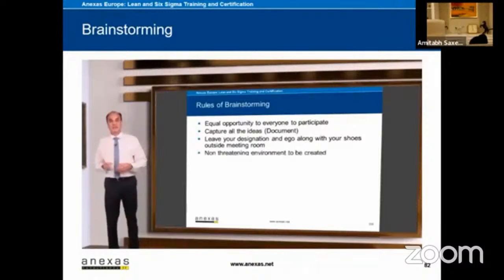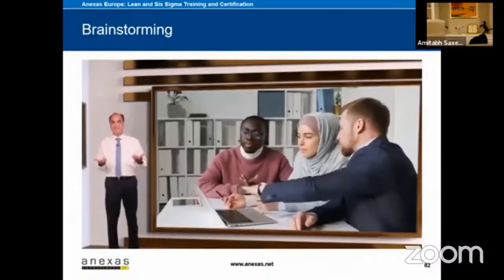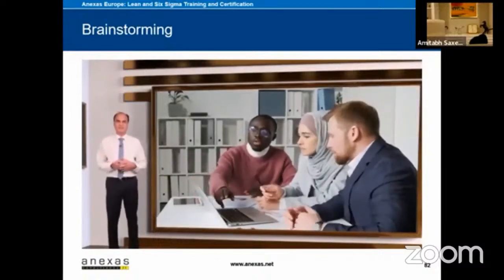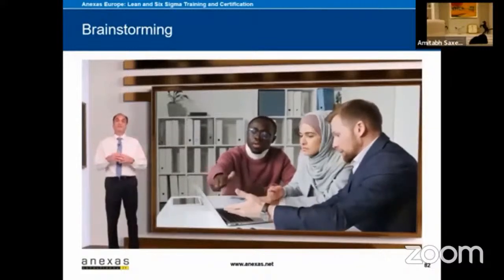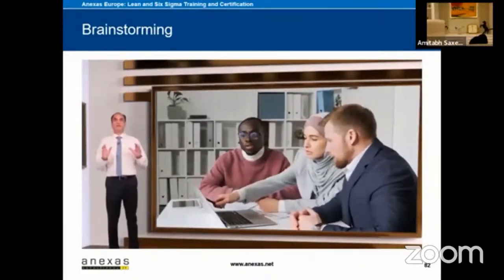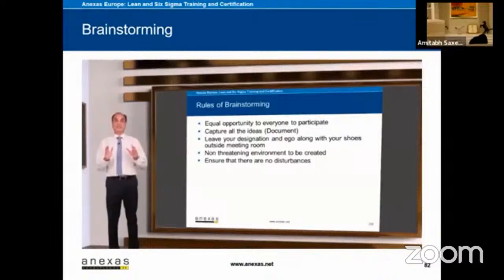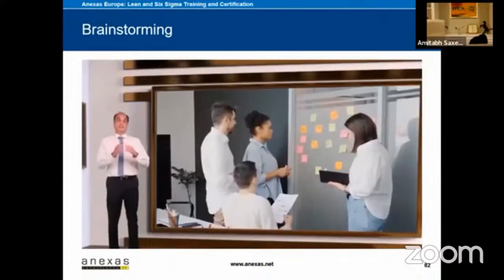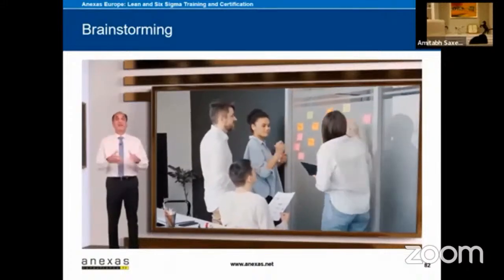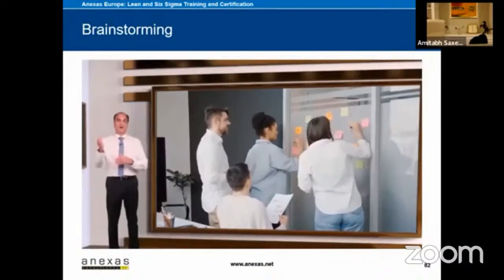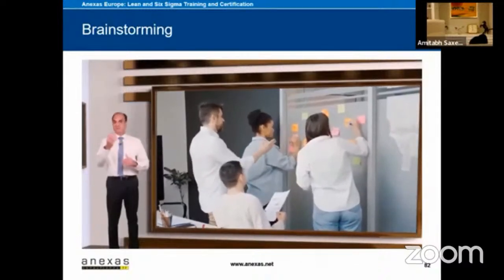There should be a non-threatening environment. When people are giving ideas, they should not be afraid of giving ideas. So you should create an environment where people are encouraged to give ideas. Also, we should ensure that wherever the brainstorming is taking place, there should not be any disturbance, so people are focused on brainstorming. Sometimes people might deviate from the topic. There is a tendency that some important issue crops up during the discussion, so at that time you can always create a parking lot, saying that this idea or this issue is very, very important, and we can park it to be discussed after a while, once we complete the brainstorming on this particular topic.